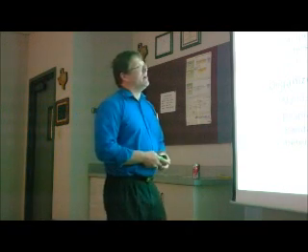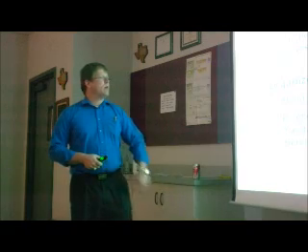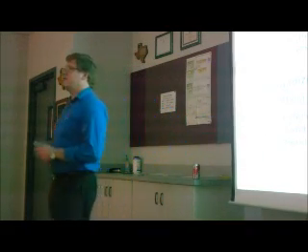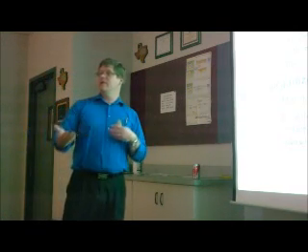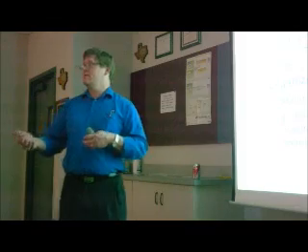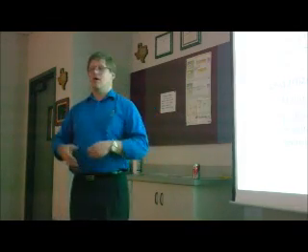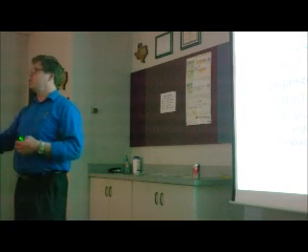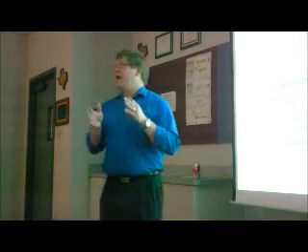Multimedia applications have high volume, financial apps do too. Organize network requirements into mandatory, desirable, and wish list requirements. Why? Because we've got to take this design, this proposal, to management, right? Management's going to say yay or nay. We've got to have some kind of a list of the various types of network upgrades that we're going to plan on implementing over a year or whatever our cycle happens to be, so that we can say, okay, these are the ones that we have to get done.